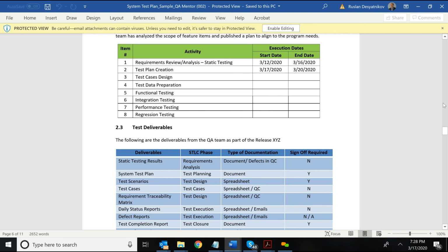So with any estimation, the rule of thumb is you add a contingency on top of it. If I have 3 days, I add half a day as a contingency. In other words, for every day, I will add 1 hour, 1.5 hours of contingency, just to be on the safe side, because anything can go wrong.